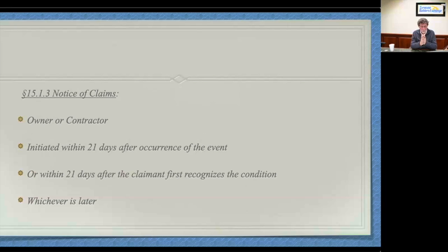Contractor wanted a couple hundred grand. The state agency, DASNY, said, we'll give you like 70,000. My contractor said no. And they moved forward, did other work. State tried to issue a forced change order. Contractor rejected it. Now the job is substantially complete. Okay. Now the contractor brings up, and this is many months later, obviously, that dimension in the ceiling space, that's going to be one of the first things you as an electrical contractor encounter. So a year later, job is substantially complete, contractor brings it up again. State says, well, we'll still give you what we had in the forced change order. We'll give you 70 for your 200. Contractor says no, lawsuit ensues.